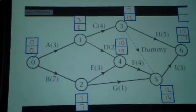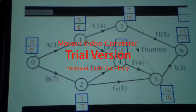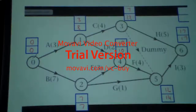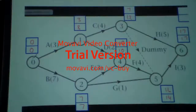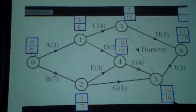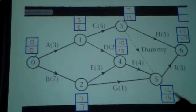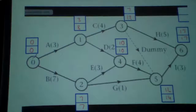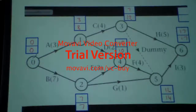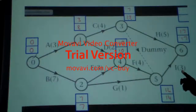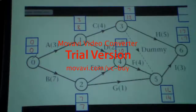Then from 17 to 12, if we go that side: 12 minus 4 is 8. Same thing. If we come to point 2, either 10 minus 1 is 7, or 10 minus 3 is 7 — you have to take the minimum, which is 7. If we go there, 7 minus 7 is 0. And 8 minus 3 is 5.